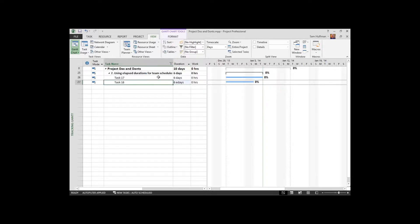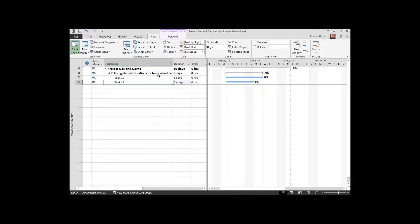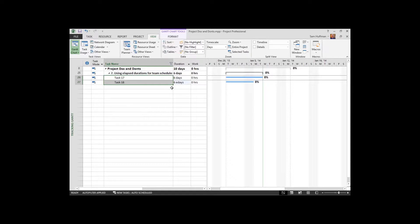Now the first thought here is, oh, that's great. That looks at a calendar kind of the way I look at a calendar. Six days means six days from today, not six working days from today. But don't fool yourself. This can have a huge ramification.